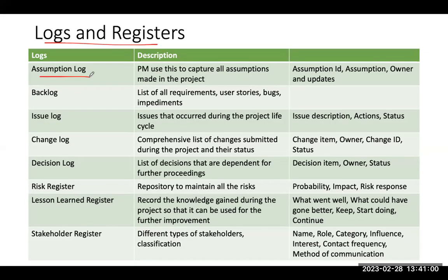As a project manager, we use this assumption log to capture all the assumptions that are made during the initial phase of the project. For example, when we are in the initiation or in the discovery phase of the project, as a project manager, I have to determine the timeline using different assumptions. For example, a resource A is 100% dedicated to the project. If I'm making that assumption, I will capture that in the assumption log.